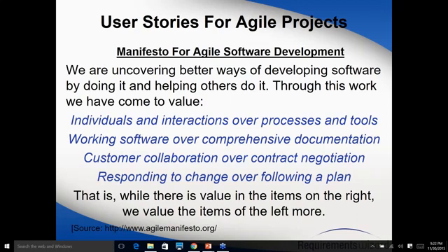In Agile, the idea is to keep your scope very fluid, not to lock any phases. So if we take the same scenario, but instead of waterfall we are doing Agile, by the way, there is no role of a PM in Agile, but there is another role, what we call the Scrum Master. When the customer comes back and says we have to add a new requirement, as a Scrum Master I will talk to my customer and see where we can fit that new requirement, in which sprint or which iteration we can do it.